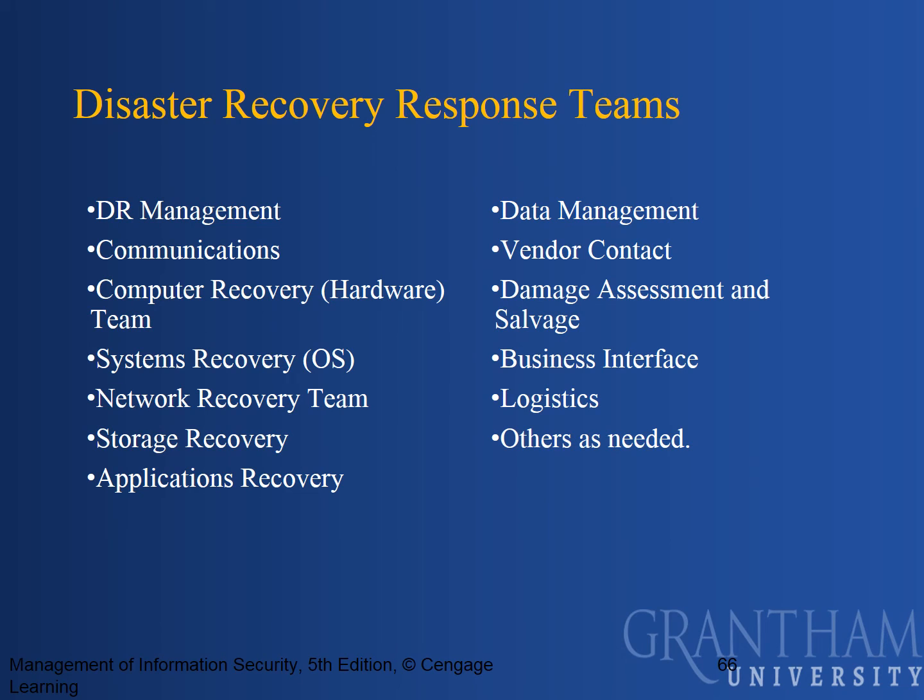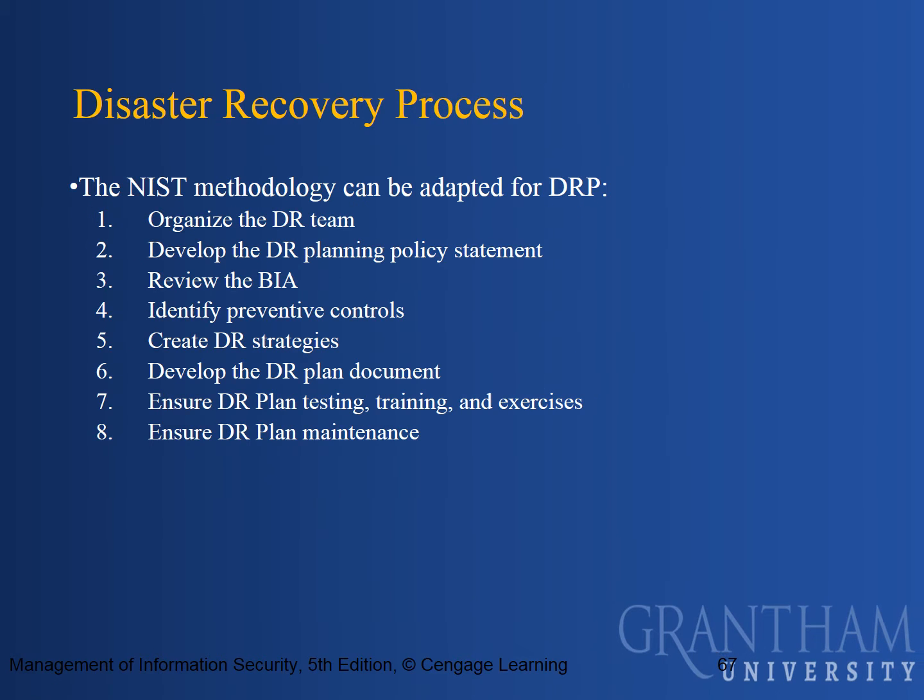Disaster recovery response teams can be broken into disaster recovery management, communications, vendor contact, data management, and the others shown here. The NIST methodology can be adapted for DRP as well. You can organize the team, develop the policy statement, review the BIA, identify preventative controls, create strategies, develop a plan document, and then test, train, exercise, and perform maintenance on the plan. Remember, it's a living document too.